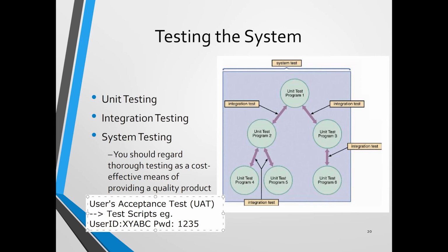After that, when the development phase is finished, users pay 30 more percent, and on the user acceptance test sign off we get the rest of the money. So this might be the milestone to get the money from the company.